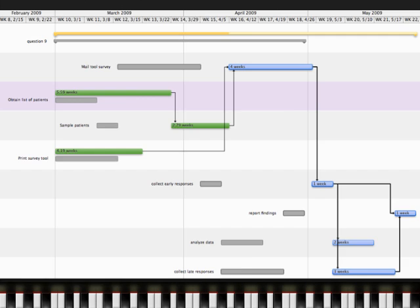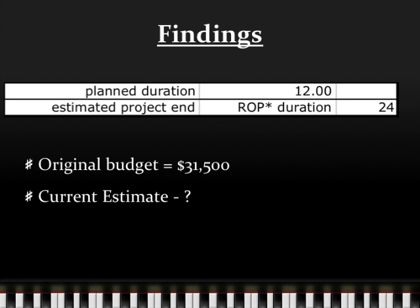To calculate the adjusted planned duration, we must consider the project's initial planned duration. As with the previous problem, we are only concerned with the critical path. The planned duration was 12 weeks. The rate of performance is 200%. Therefore, the project can be estimated to take twice as long to finish, or 24 weeks. The original budget is based on each task's planned estimate. The current estimate cannot be calculated, however, because of insufficient data.